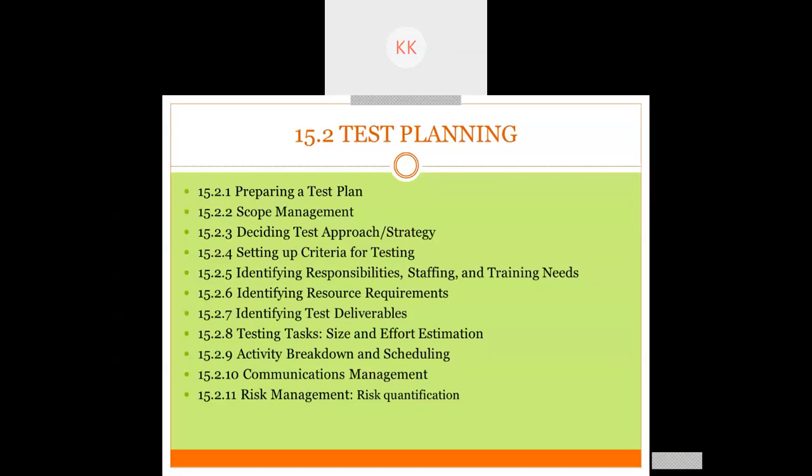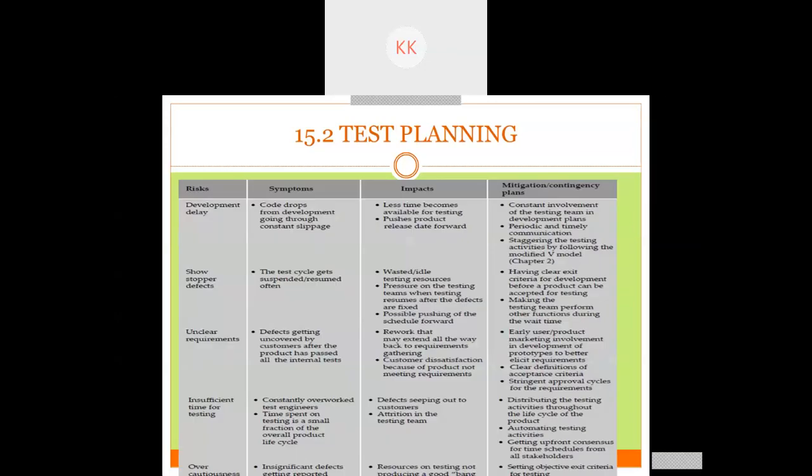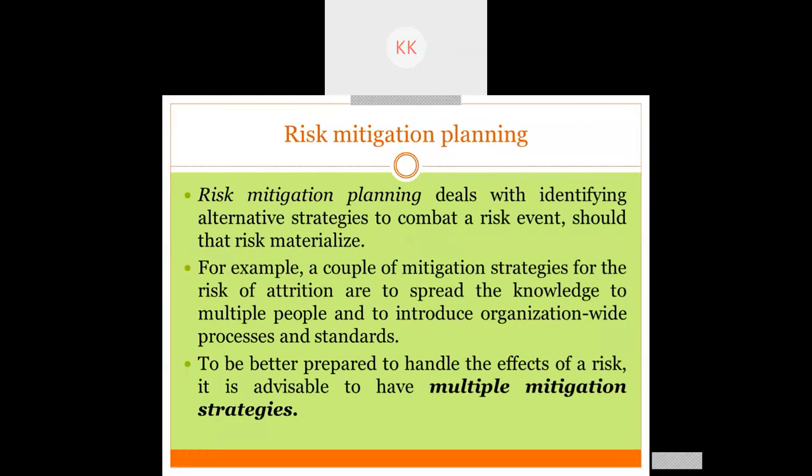We need to manage the communication so that all the information is seen in a synchronized manner. Everybody should know what their responsibilities and duties are. And the last point was risk management, risk quantification, and risk mitigation. So we need to identify the risk. We need to divide the risk by severity, and we need to categorize the risk accordingly.